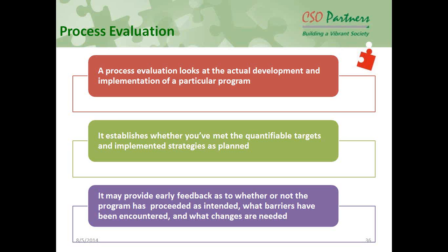Then during process evaluation, you will have to do the reflection process. Is there any problem in the training methodology? Is there any problem in the selection procedure of the participants? Is there any problem in the materials? Do we need to have a refresher training? These are the mid-course corrections we can do, so that it is not only quantification, it is also quality that we can measure. The quality of the process and the quantity of the process we can measure, and you will have to do it on a continuous basis throughout the project life. So that is why it is so important to plan your process evaluation.